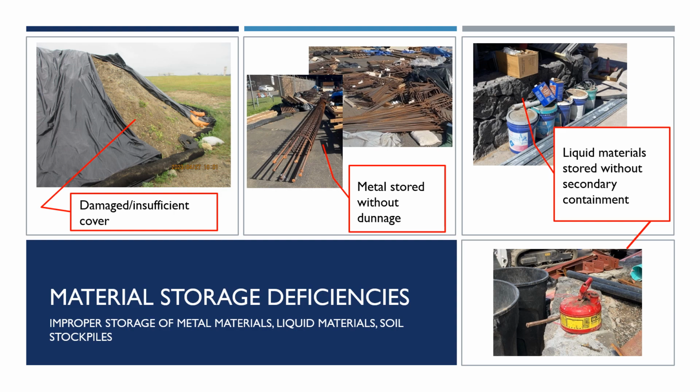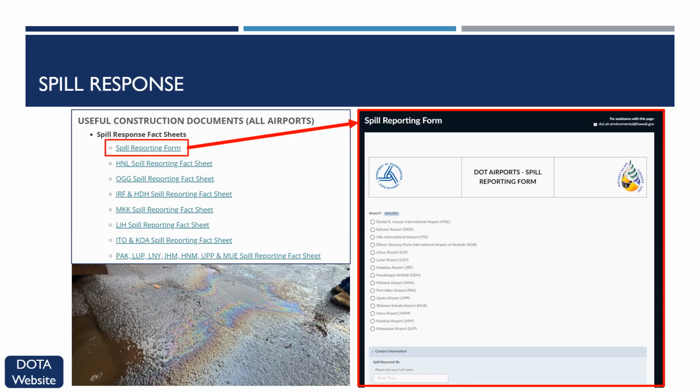and a cover. The SWIP or SSBMP plan developed for the project site will include a section on spill prevention and control. It's important for the project team to be familiar with the proper response practices for their site. All spills identified during AREE inspections will need to be cleaned immediately, and documentation of cleanup efforts will need to be provided to the AREE inspectors by the end of the day.